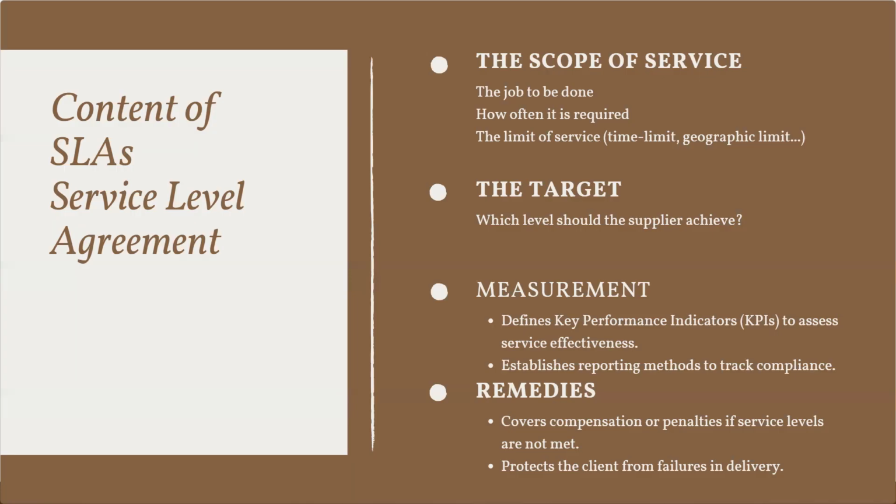The SLA must contain the section of the target and what is the target for the supplier to perform. And if they fail to do that, then what could be the remedy? The SLA can also include the measurement like KPI. KPI and SLA complement each other. The KPI gives us the assessment and gives us the data, while SLA gives us the target and the remedy. So we need to use them in combination.